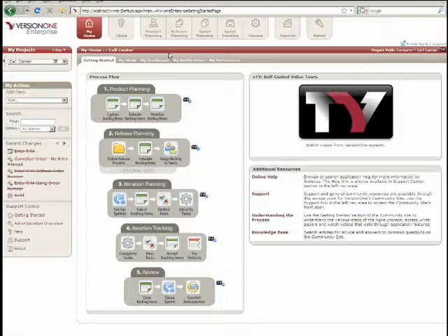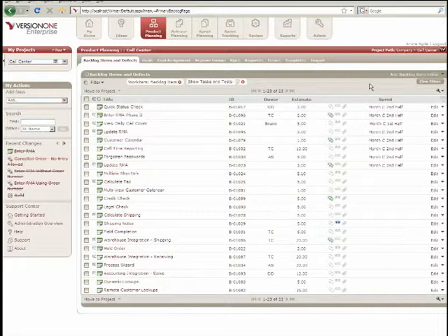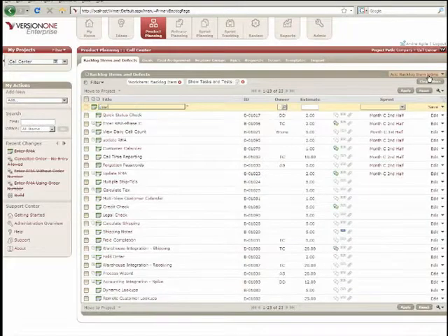If I'm going to put in a placeholder into my backlog, I know that, for example, at some point in time, we're going to have user documentation. I don't know what that means yet. I don't know the extent of that. I am, as a product owner, probably going to give it a very high estimate of like 100 to make it visible and kind of force me into saying, oh gosh, we've got to break this down.